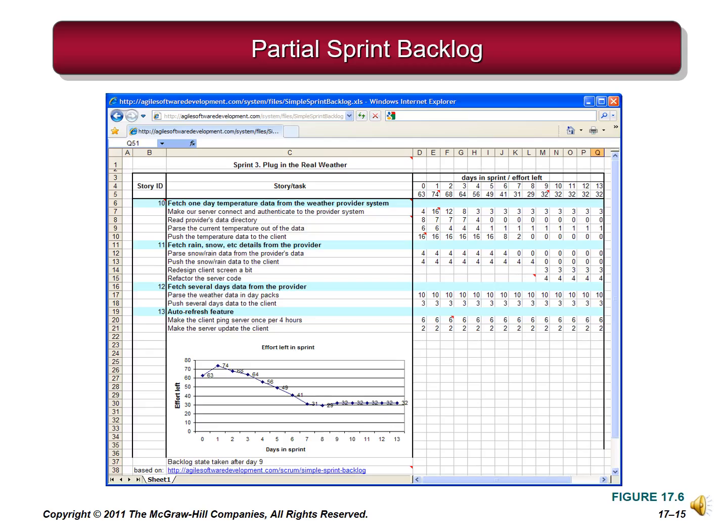The sprint backlog also serves as a status document by listing the person responsible for each task, remaining hours of work, and recording the task as finished, in process, or not yet started. This figure, for example, illustrates an example of a sprint backlog.